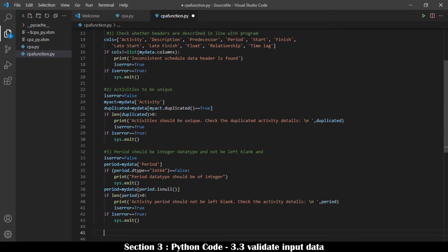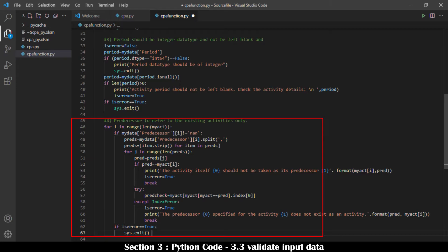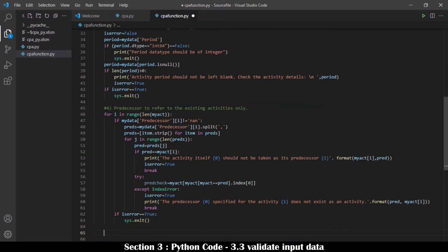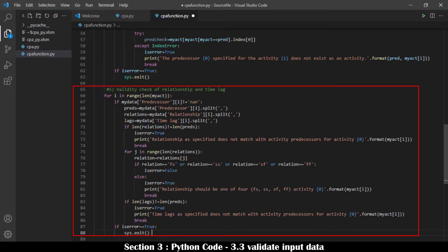Predecessor should refer to defined activities only. Predecessors entered in a cell are separated by comma, and each individual predecessor is extracted using the string split method. Each predecessor is then checked against the list of activities. Additionally, activities' relationship and time lag should have the same count as the activity's predecessors, each separated by comma. For instance, if the number of predecessors is two separated by comma, then both relationship and time lag should also each have two entries separated by comma. Leaving blank is not acceptable.